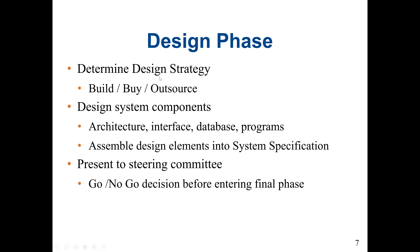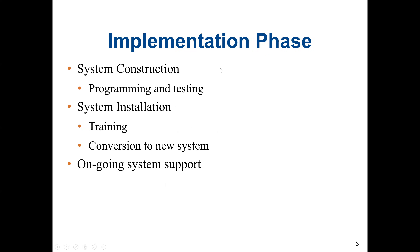In the design phase, we determine the design strategy — whether we should build a system, buy it, or outsource it. Then we come up with the design system components, such as the architecture, the interface, database programs, and we assemble design elements into system specifications. We then present our system specifications to the steering committee or stakeholders to get a go or no-go decision before entering the final phase, which is the implementation phase.